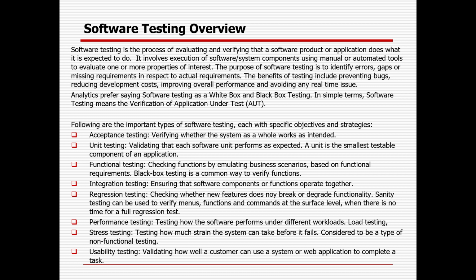As soon as you identify a defect at an early stage, the fixing cost will be less and less. That is the reason nowadays testing also starts from the early stage, from the requirement stage itself. The objective is that you discover as many defects or identify gaps as possible, so that prevention or fixing cost will be less, and the project can go smoothly without any delay or slippage. There are a lot of kinds of testing. First, testing will start with unit testing, where the developer will do the testing and certify that the basic component-wise things are working or not.